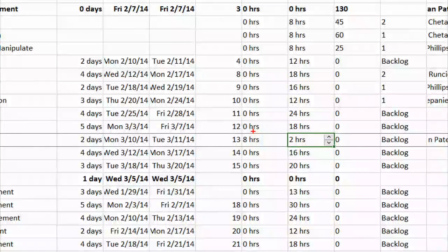Yes? So we have a TFS workflow set up, so the same patch goes to different teams, right? Testing, whatever. How does that work? This seems more one-dimensional. So your workflows are happening in TFS, not necessarily in Project. Remember, the idea is you can start in TFS and push it to the project file. We just need to synchronize the project schedule and the TFS project together. So when the workflow changes to a different resource name, it understands that and they can put their actuals in. Yes, that is correct. Yes, absolutely. Great question.